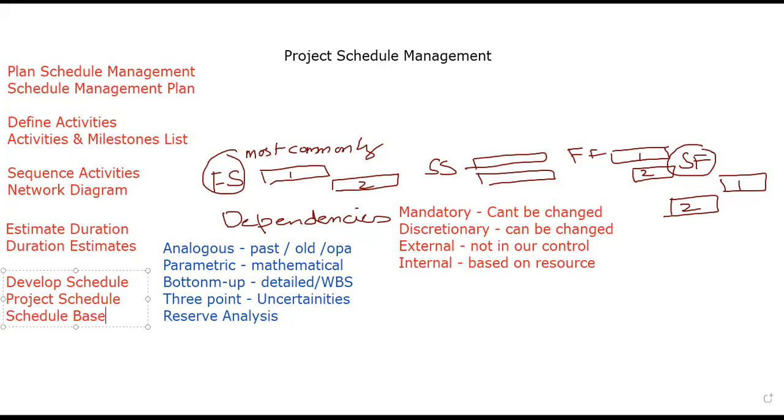While you are making that schedule, you will perform the schedule network analysis to find out if there are resources which are overutilized or which are not available. If those resources are very highly skilled and have constrained availability, in that case we use a thing called pre-assignment. We allocate the resources, so we don't need to worry about those things because they are scarce resources.